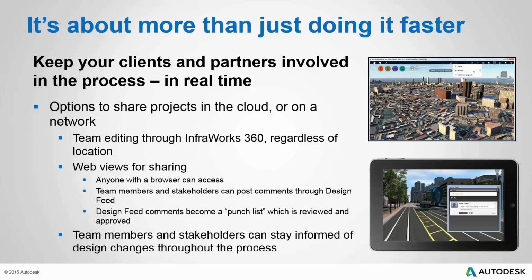But they can do more than just view the model. We've also got the built-in design feed where they can make comments and request changes. And the way this technology is set up, it can easily become a punch list for the design team where they can address the comments and keep track of what's been reviewed and approved. The bottom line here is that team members and stakeholders can stay informed and involved in the design changes throughout the process.